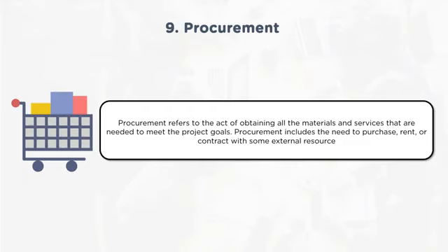Another one is fixed price, where the project manager or the organization awarding that contract to a supplier will not know what the cost is. Instead, it is a fixed price. But important here is that the scope of work needs to be clearly articulated and defined.